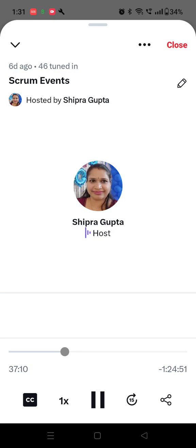So and so people will be on holiday, and roughly I'll be able to deliver so many story points. So let's say you say I can deliver 100 story points. Then you have your product backlog items, and first you have shortlisted the product backlog items, and you have said these are the items I'm going to look at in this particular sprint. So this is my sprint backlog.